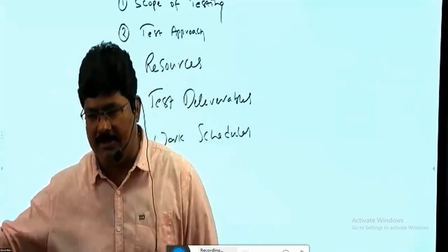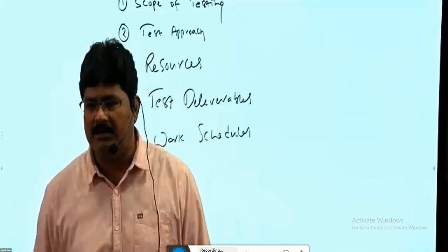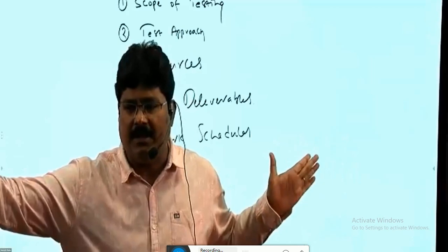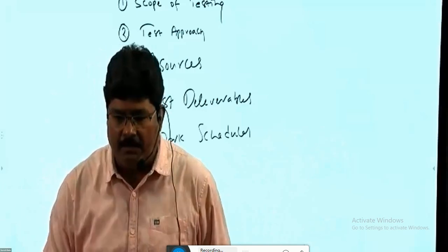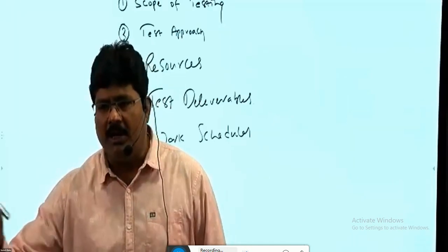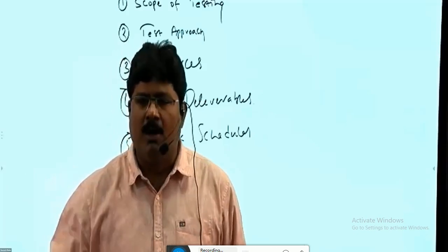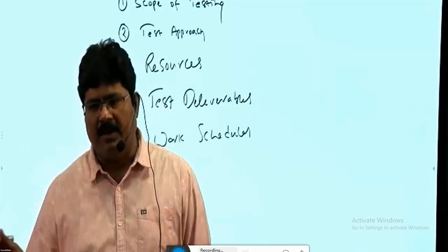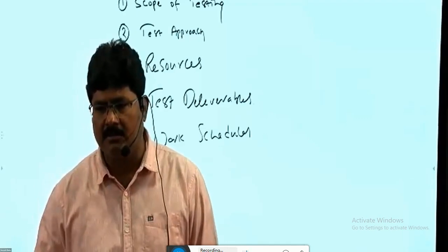Phase 1, phase 2, phase 3. When the basement is finished, requirements are done, 20% of the payment you have to release. When the design phase is completed, another 15% of the budget. Overall budget is 1 lakh. When the requirement phase and design phase are completed, you have to pay 20,000. Once we start the coding, when the coding is done, you have to pay another 20,000. Once testing is done, you need to pay another 20,000. Once you accept, you pay the remaining 20,000. That is the model. After making everything, you said, I do not want it. My plan is changed. You keep this website with you. What to do?